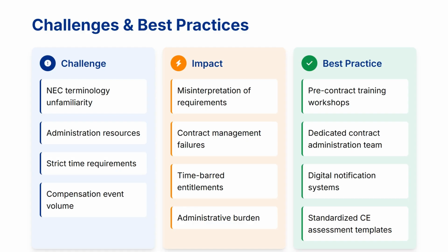Implementing NEC4 contracts presents several challenges that require careful management. First, NEC terminology differs significantly from traditional contracts, using terms like defined cost instead of actual cost and program instead of schedule. This unfamiliarity can lead to misinterpretation of contractual requirements.